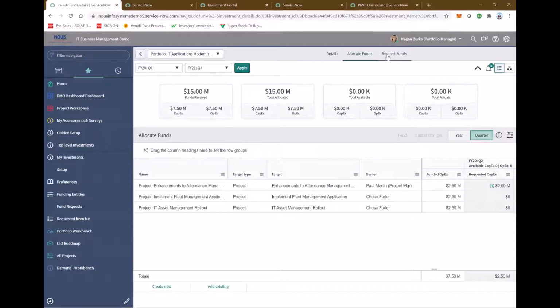The key thing is, if you're using ServiceNow for managing your project portfolio, compared to other tools where you have to send out a separate request to your finance team saying, hey, I need these dollars added to my project for this particular quarter, because my project started 6 months back, but I underestimated, or maybe there is a new requirement that has come in, so I need an additional $30,000 added to my project budget. That is something that happens outside of the system in normal organizations or in normal systems outside of ServiceNow. In ServiceNow, you don't need to do that. Your finance manager or finance director is able to take a look on the ServiceNow platform and handle the approvals for those sorts of things.